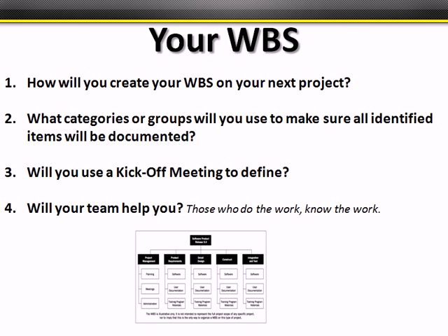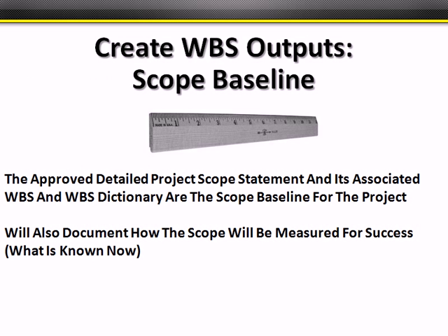Will you create this or begin to create it in your kickoff meeting? And will your team help you? I mean, you can't be responsible for doing everything. In fact, PMI says creation of the WBS can be used as a team building activity. That way everybody gets to know what everybody else is responsible for, and there can be really good discussions on how they can help each other execute the scope of work.